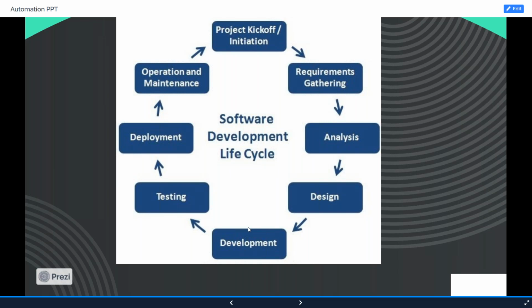And during the development phase, the role of the automation team will not be anything. Once they deploy it to the testing environment, then the role of automation testing comes into the picture. These days, organizations are working in such a way that manual testing and automation testing go hand in hand. Like, if the manual testing is happening in the ith sprint, then the automation team will do it in the next sprint, the coding part. Always, the automation team will be one sprint behind the manual testing while coding the scripts. Okay.